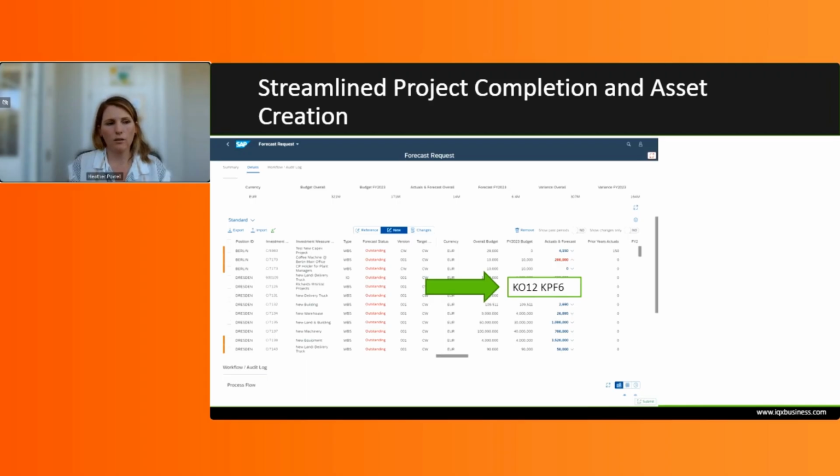With accurate forecasting, project overruns can be prevented, and in many cases, forecasting will result in budget having to be moved around. Previously I mentioned that within the annual business planning application, if you're retrieving those projects that are live, that are incurring costs and already have budget assigned, you might have to maneuver the budget around. Maybe you have to take from one project and assign to another. And that annual business planning request app enabled that budget movement to happen between internal orders within a project if that was needed, or between projects.